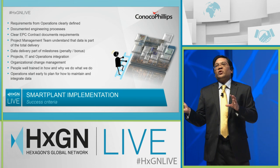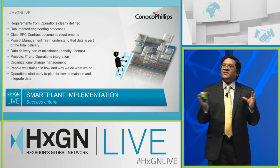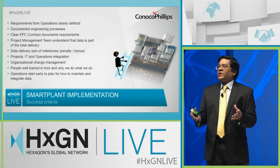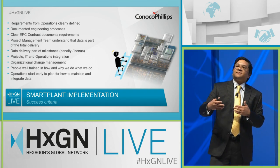And we need our operations group to plan early how they're going to receive the data. In Norway, the transition to smart plant was really driven by capital projects. And operations, they saw the advantage of intelligent data, but they really didn't start structuring their own systems to receive intelligent data from the project group until fairly late in the game. And that has to happen much, much earlier if you're going to have long-term success.